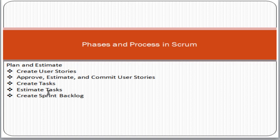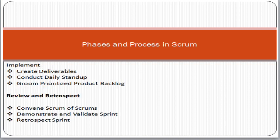For example, you need some hardware — what type of hardware is needed, what will be the cost, how many resources are required, what skill sets are needed, and what are the estimates for those resources. Then we create the Sprint Backlog. The Sprint Backlog is a subset of the Product Backlog — for example, if the Product Backlog has 40 tasks, you take 10 tasks for a sprint. The Sprint Backlog contains the requirements to be delivered in a sprint, which is a three-to-four-week time period.